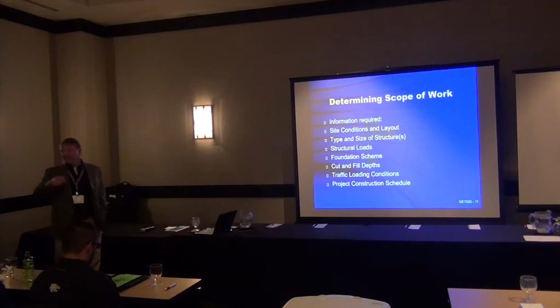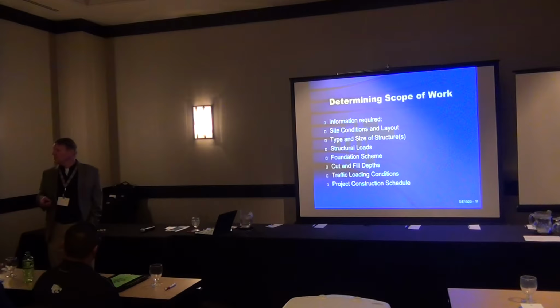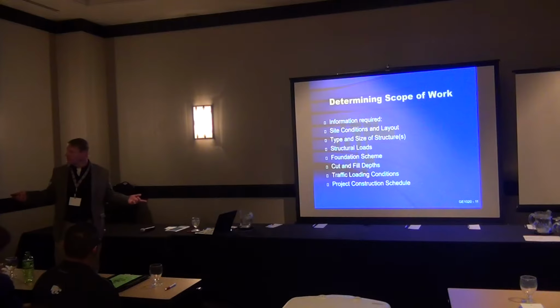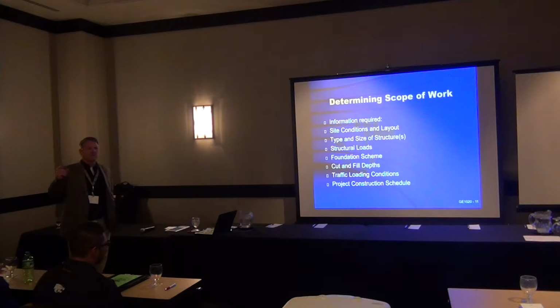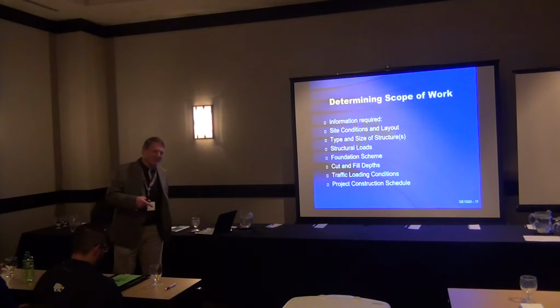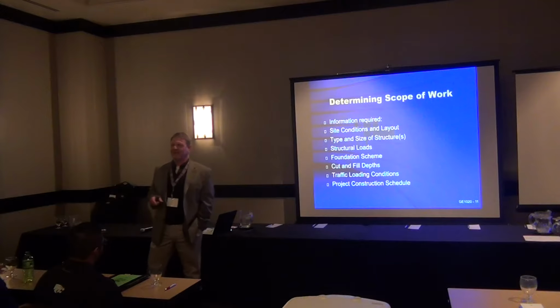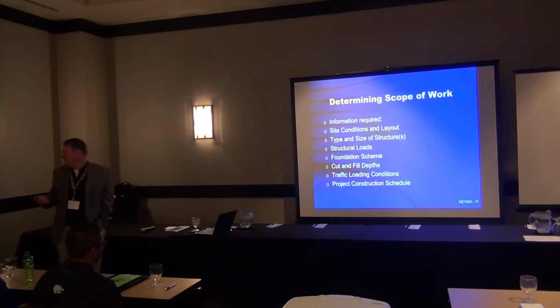And then lastly, and this is a piece that we rarely get the opportunity to know in advance, is what's the construction schedule? Because it makes a difference whether you build something in August in the Midwest or whether you build something in December. There's some tricks that you need to be aware of. There are some things you have to take into consideration depending upon what time of year it is in this part of the country. In some parts, in Phoenix, it doesn't matter. It's hot all the time. We're not hot all the time. We go through long periods of wet weather, followed by long periods of hot weather, followed by long periods of cold weather, and a couple of three nice days in there. If you're a golfer, you want to go out and try to golf, right?